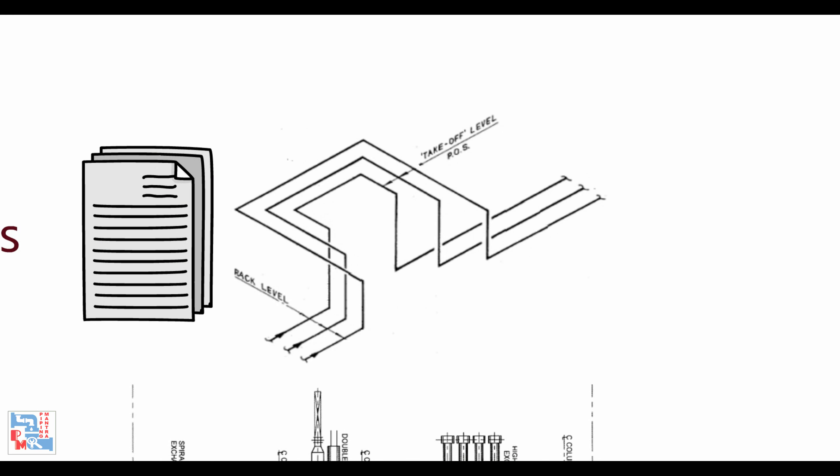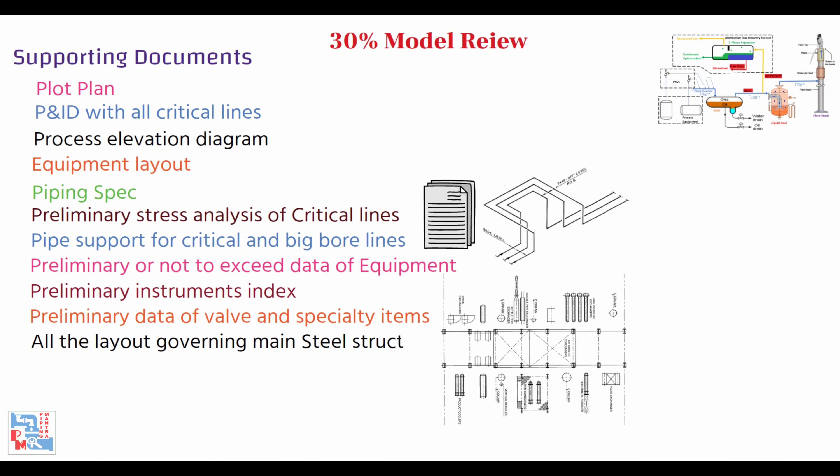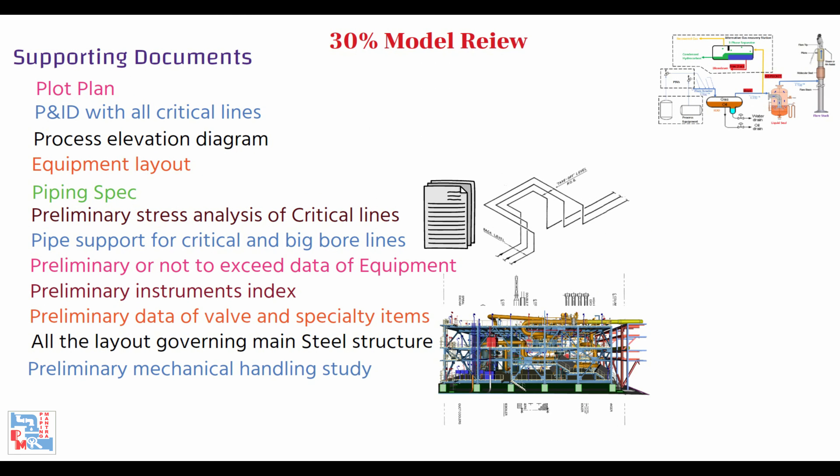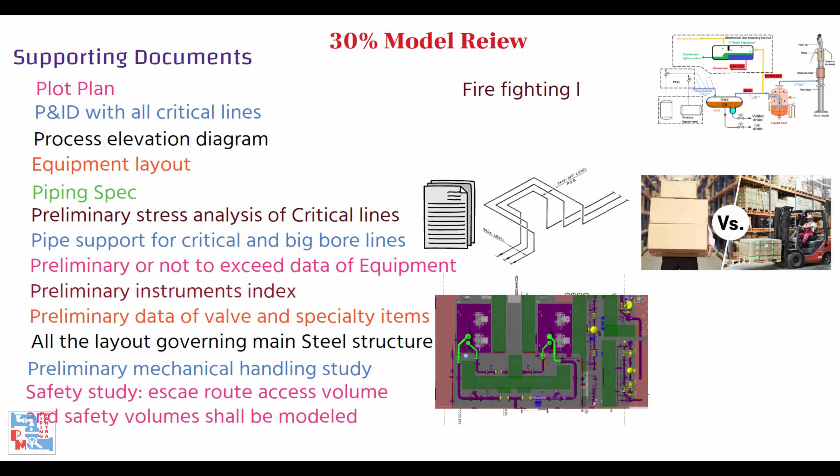Pipe support for critical and big bore lines, preliminary or not-to-exceed data of equipment—if no data available, model box shape with past project data. Preliminary instruments index, preliminary data of valve and specialty items if available, all the layouts governing the main steel structure, preliminary mechanical handling study and based on that volume should be modeled, safety study based on that escape route access volumes and some additional safety volumes shall be modeled, firefighting layout, underground layout and facilities.